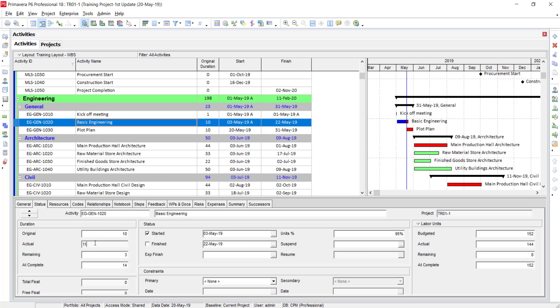The Actual Duration is now showing 11 because it is calculated from the activity's start day to the schedule date. I have put the remaining duration as 3, so 11 plus 3 equals 14 — meaning this activity is expected to complete on the 14th day according to current progress. You can get this remaining duration from site management, or estimate based on your experience of how much time the balance work will take.